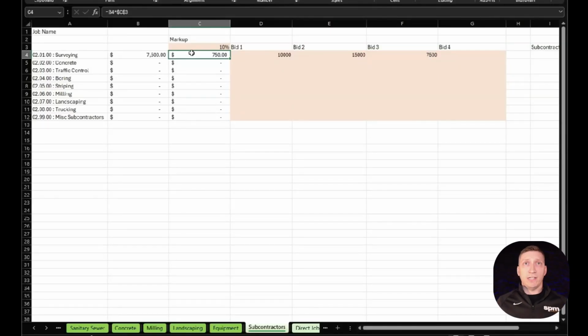So you still have to receive their invoices. You still have to process their invoices. You still have to write them a check. You still have to call them and make sure that they're going to site. You have to invite them to sub meetings. You have to coordinate with them. There's a lot of work that's not attributed anywhere else on here. Remember, everything we've done so far has been how much work does it take to do that task. There's no foreman time. There's no oversight. There's no anything like that. Same with the subcontractor.